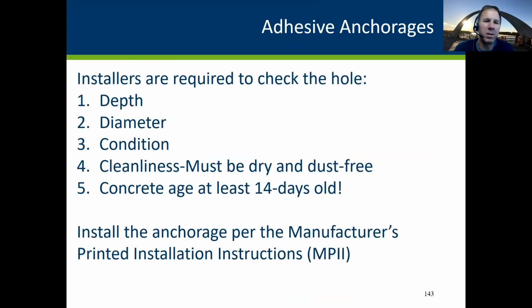The installers, there's some basics there for adhesive anchorages that they're required to check: the depth of the hole, the diameter of the hole that they're drilling, the condition of the hole, is it really smooth or rough? Core holes are not as good as rock drilled holes for roughness, and so certain epoxies might not work in those. Cleanliness: the hole must be clean, dry, and dust free. So if you were to use a paper towel and put your finger on it and put it in the hole, you shouldn't see dust.